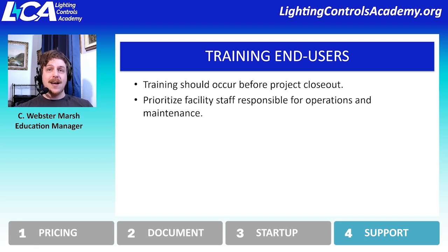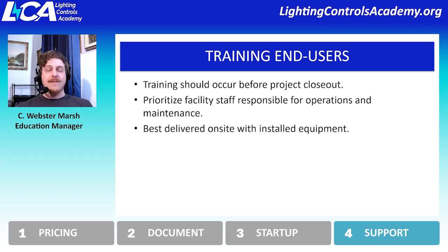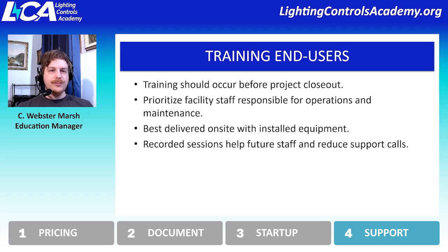And so really identifying which groups should be trained is important to do early on in the process, and then schedule that training and make sure that they have been given this training on site with the equipment that they're going to need to be using. That way they aren't just being trained in a sterile, unclear and unrelatable environment. It is their equipment that they're working with. They understand it.